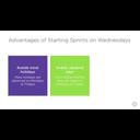If you need to choose a day when most of your team is most likely to be in the office, then Wednesday is a great choice. Wednesday also has the added advantage that unless it's a holiday weekend, your team will usually have about 1.5 days after the weekend to wrap up any final work ahead of your Tuesday afternoon sprint review. And you'll have 2.5 days to gain momentum after your Wednesday morning sprint planning before you're interrupted again by the weekend. But I'll mention one more advantage just in case I haven't convinced you yet.